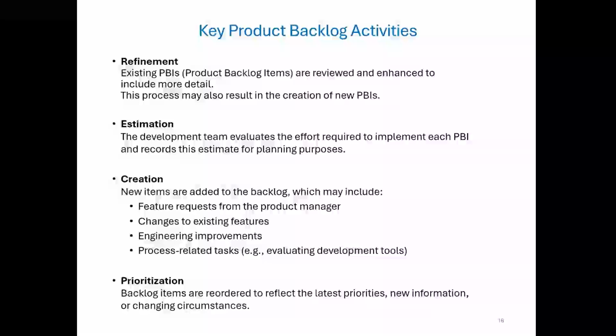Next, creation. So new PBIs are added continuously. These might include feature requests from users or the product owner, updates to existing features, engineering tasks like code cleanup, process improvements such as tool evaluation or testing strategies. So anyone on the team can suggest new items. What matters is that each one is captured, discussed, and properly detailed before implementation.